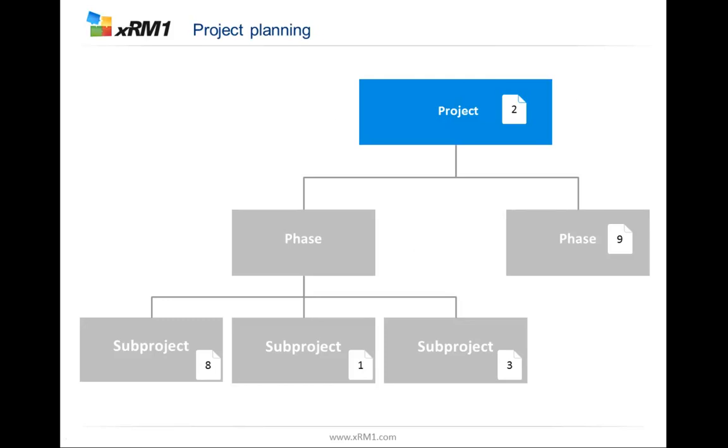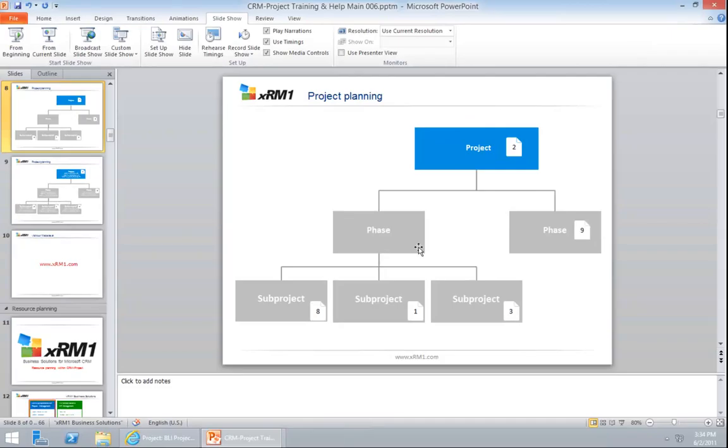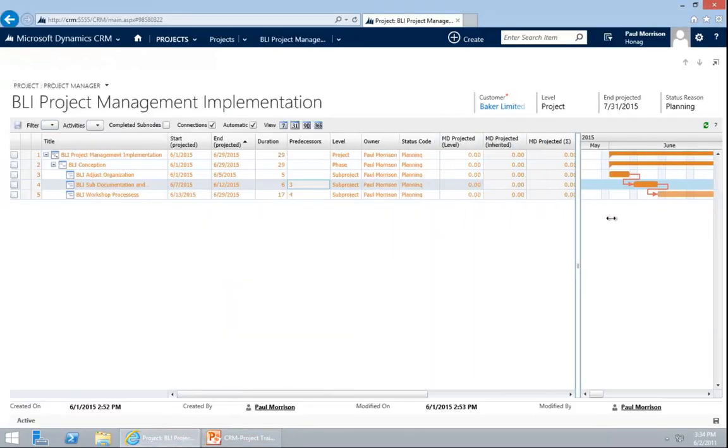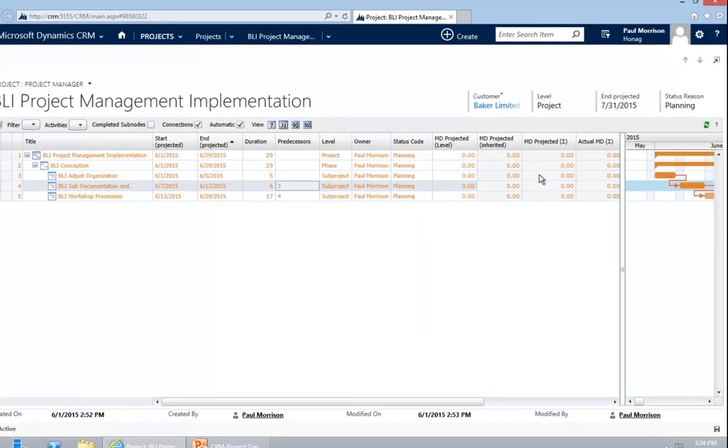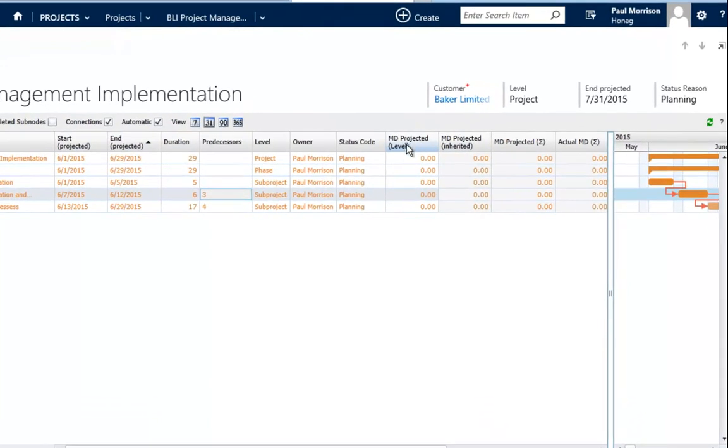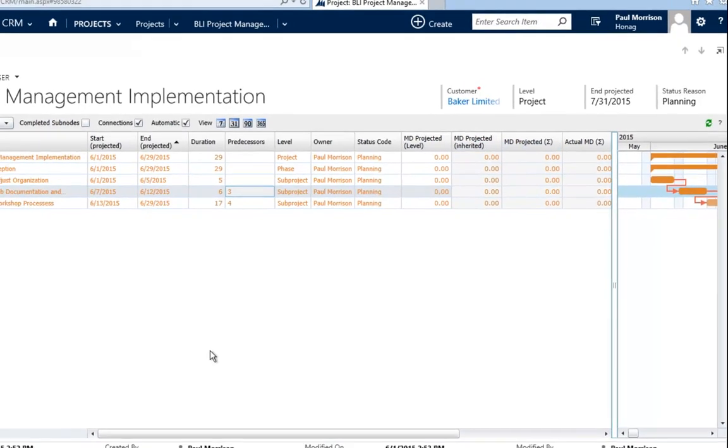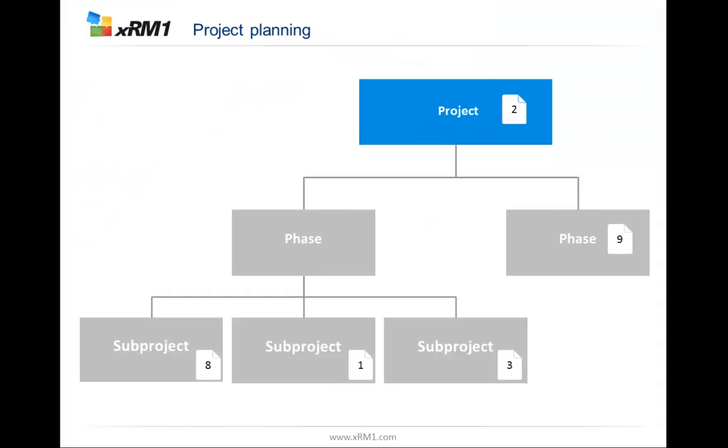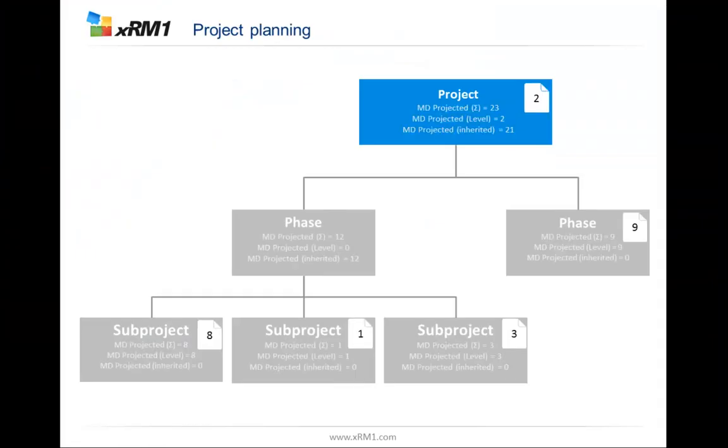Within CRM project you have work inheritance. What does it mean? Within a project, I go back to my system, we always have 3 columns. You might have recognized them already. We have man-days projected on the level. We have man-days projected inherited. And we have also man-days projected. What are these fields? Inherited is always what comes underneath the project itself. So here in this node, we don't have anything underneath. So it's 0.